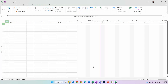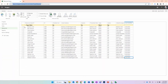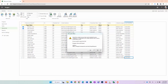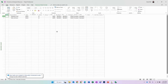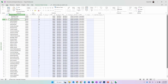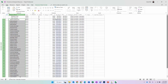Let's say there are other resources we want to add — they're not users in the system, they can't log in, but we want to be able to assign them to tasks anyway to forecast work. Maybe at some point they will log in, and we can associate a user account with them at that time. I'm going to open a couple of those resources just to get the enterprise resource pool open. I have the names of a whole bunch more resources that are not going to be users in the system but are still named resources. I want to be able to assign them to work in Project. There are their rates — I just pasted the rates. All work resources.